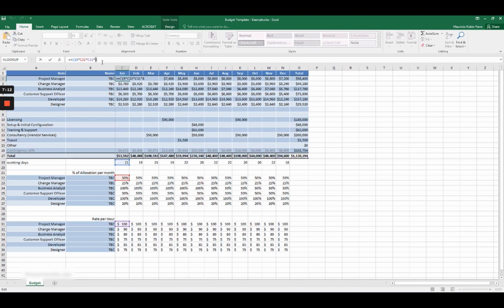And remember, this is not the salary of that person. It's how much we have to pay them for the project. Generally, this hourly rate that you're seeing below takes into account the ongoing costs, because you have to pay for everything. It's not just their salary. You have to pay for their pension, health benefits, and so forth, in terms of what that resource costs the business. And that's how you budget in your project. If you don't know this number because it's not public and it's not in a table in your company, then talk to someone in finance and ask them to confirm what rate you should be using for a particular resource and for estimating your project budget.